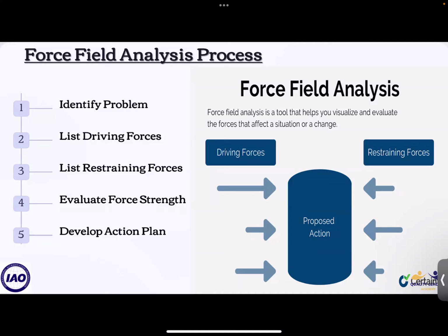If the restraining forces are stronger, it means the project is facing major obstacles. Then I determine the driving forces I have, the restraining forces I have, and I set an action plan to reduce these restraining forces and increase the driving forces.